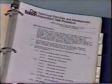The precise methods for testing and commissioning equipment vary quite widely from company to company. Make sure you're familiar with your own company's procedures. When performing commissioning tests, make sure that every problem you find, and you will find them, is explained and resolved. Do not gloss over or fudge any test result, even though people are breathing down your neck, because the equipment must be placed in service. Pay attention to detail. It is a vital part of your job.